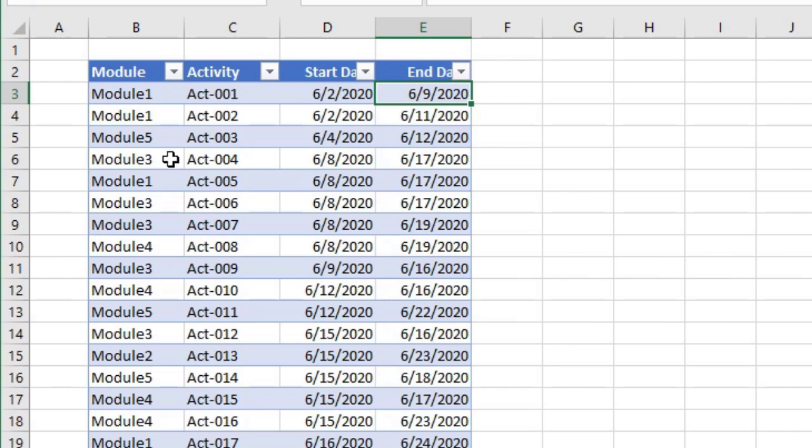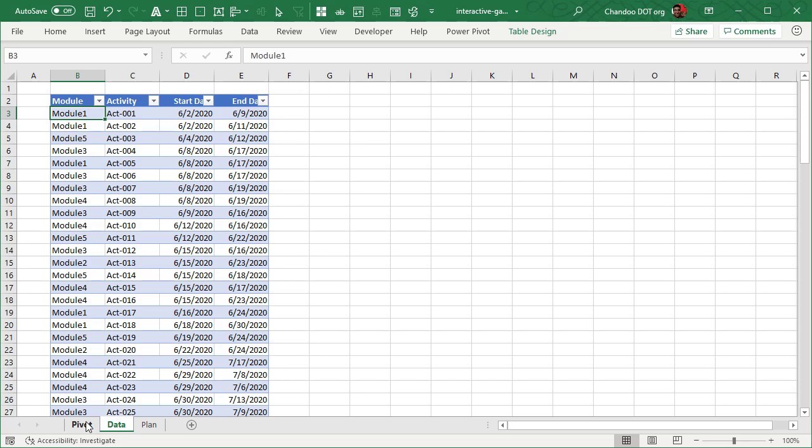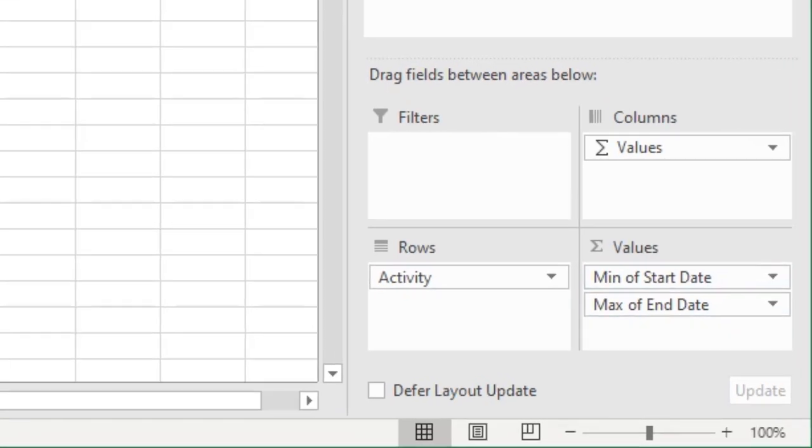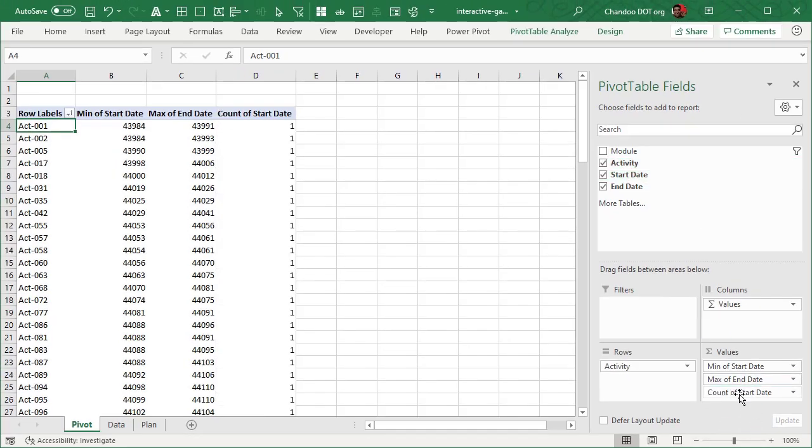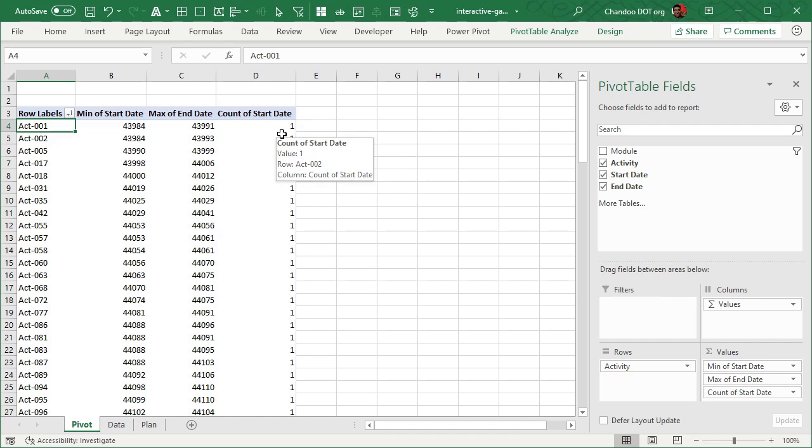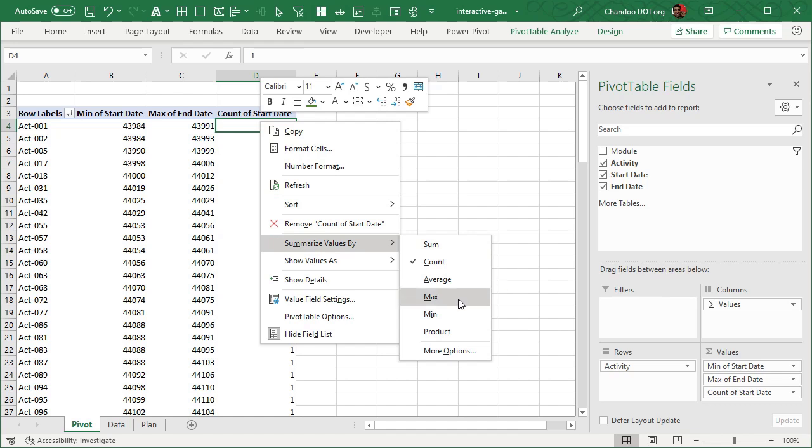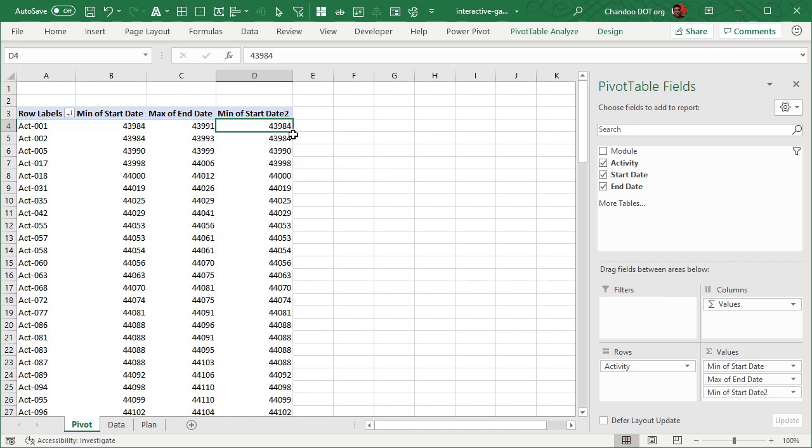So the very first thing that you want to do is take this and build a pivot from it. I've already done this, so I'm just going to walk through the process. So we will make a pivot. In the pivot row area, we will place the activity. And then in the values area, we will place a start date and end date. Now whenever you put dates into pivot table, I'll show you what happens. Usually pivot table wants to have just a count because it's a date. And pivot doesn't really want to do anything else with the date. But what you could do is you can right click and then you can say summarize by min or max. And that will basically give you a number value representation of the date. You could theoretically also use sum or average as well. And because there is only one date per each activity, it will be same.